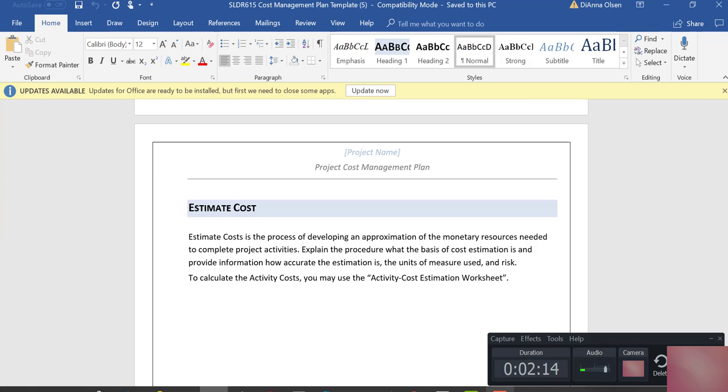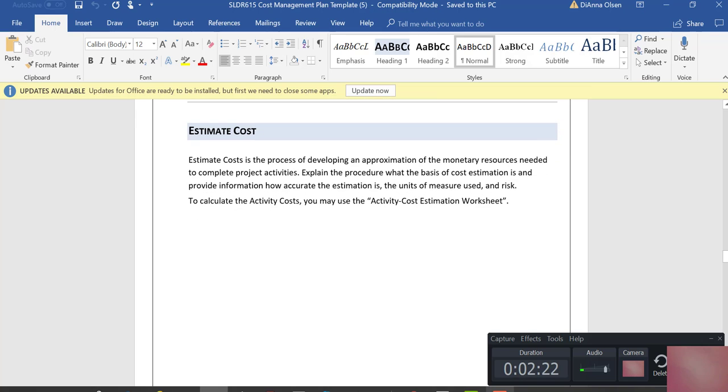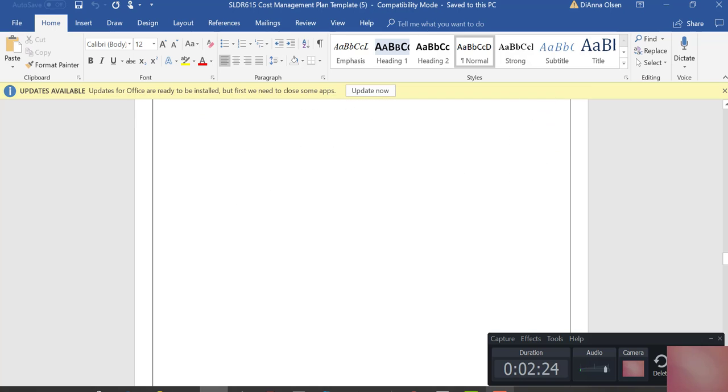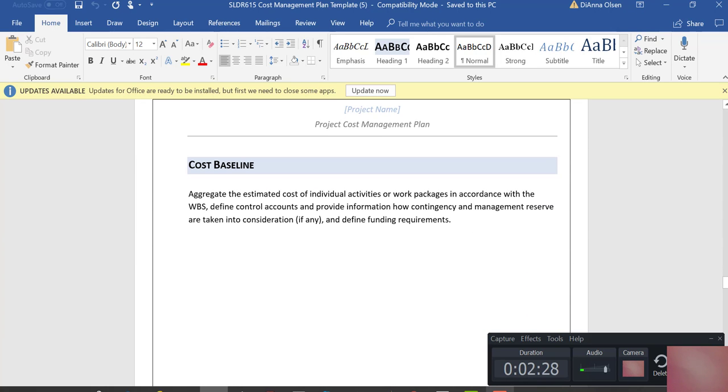What was the methodology? And then you're going to cut and paste your cost baseline from your proposal or your statement of work. Remember, I had you go back and list out, painstakingly in detail what each of your costs were, what's your labor, what's your hours. You're going to cut and paste that into your cost baseline. Here are where all of your costs are.